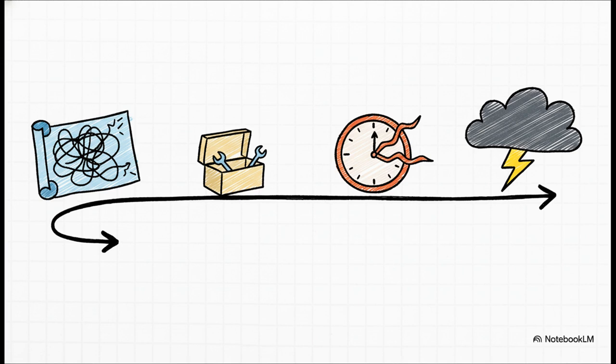Second, the resources themselves. What's the cost of skilled labor? Are materials easy to get? Third, the timeline. A longer project almost always means higher costs. And finally, you have the great unknown, risks and uncertainties. These are the curveballs you didn't see coming that can wreck even the most carefully planned budget.